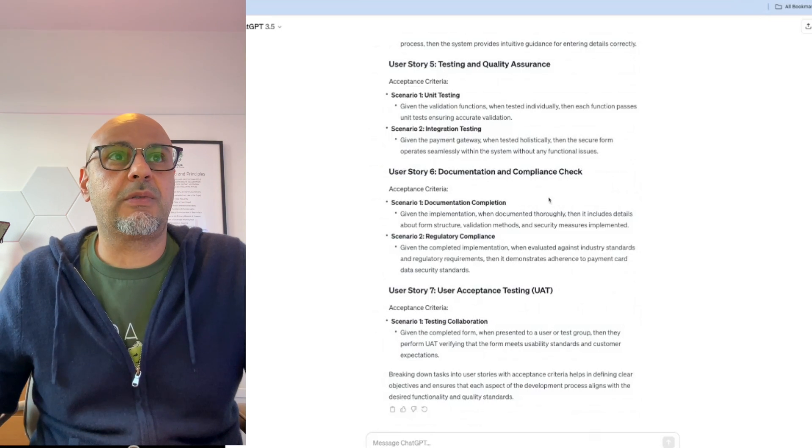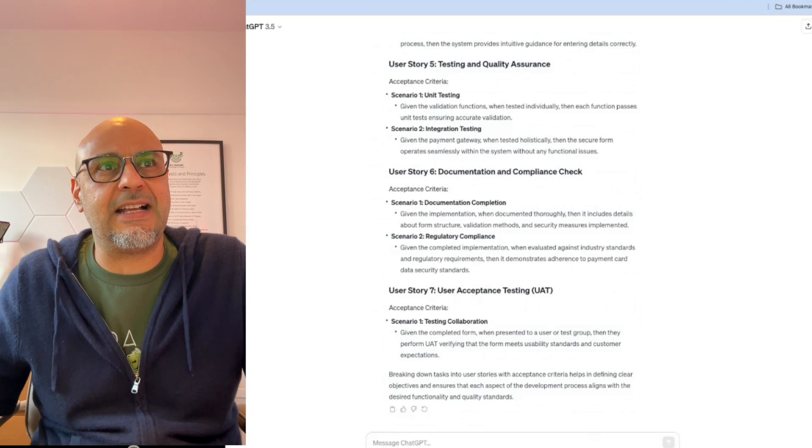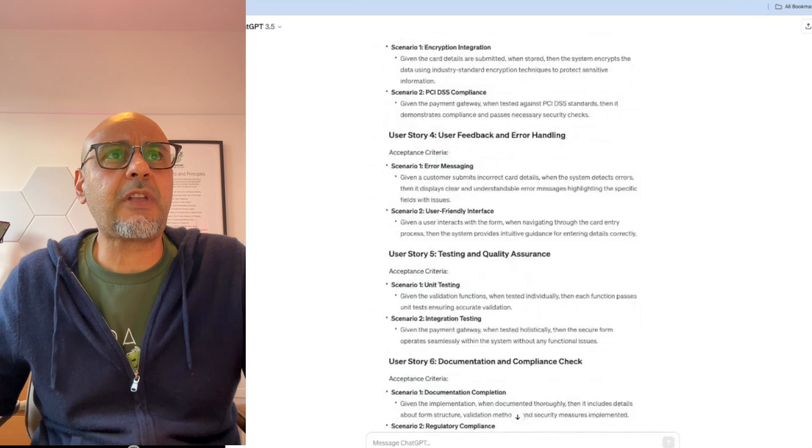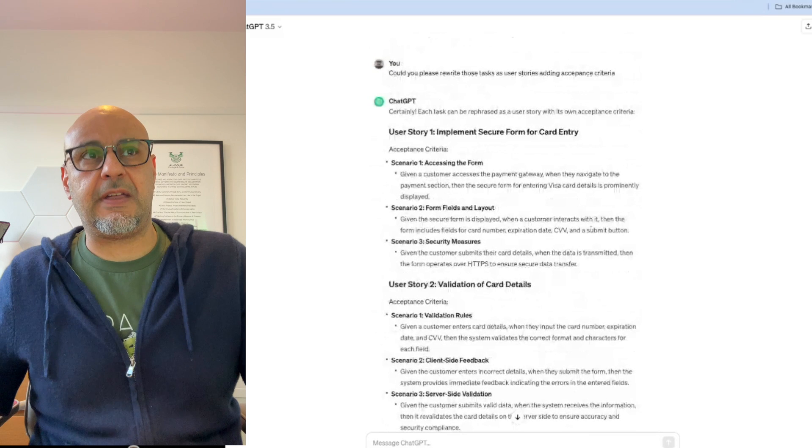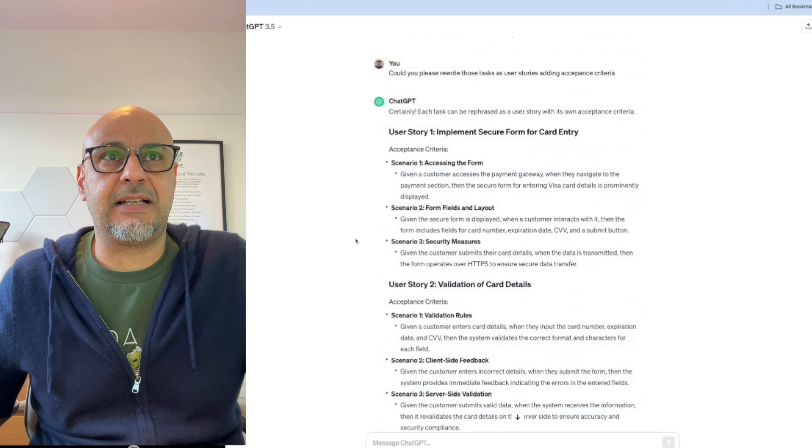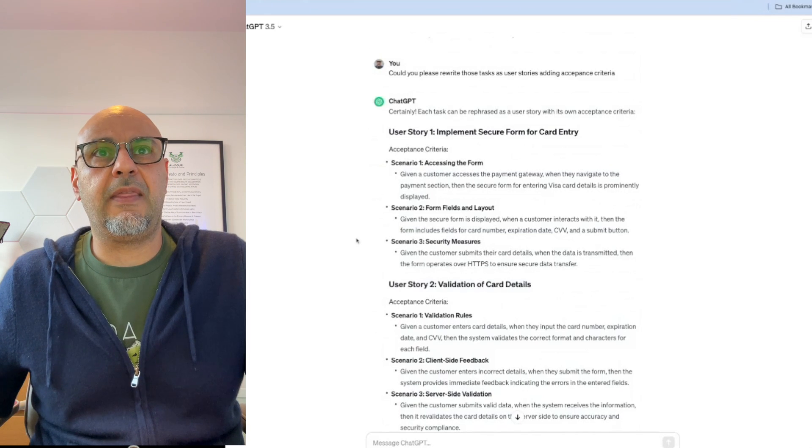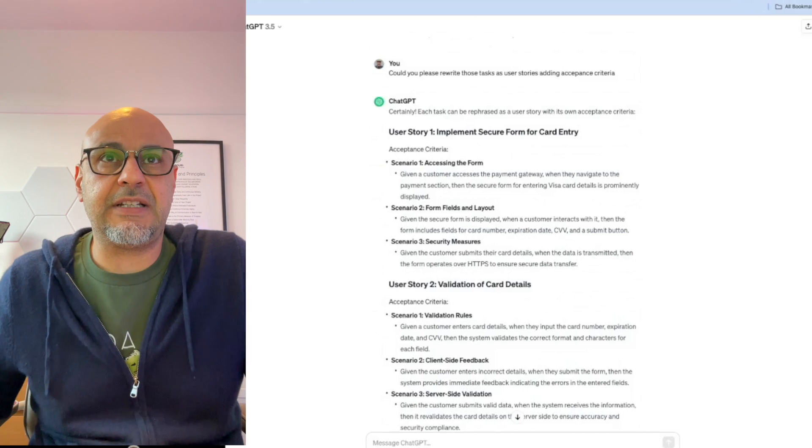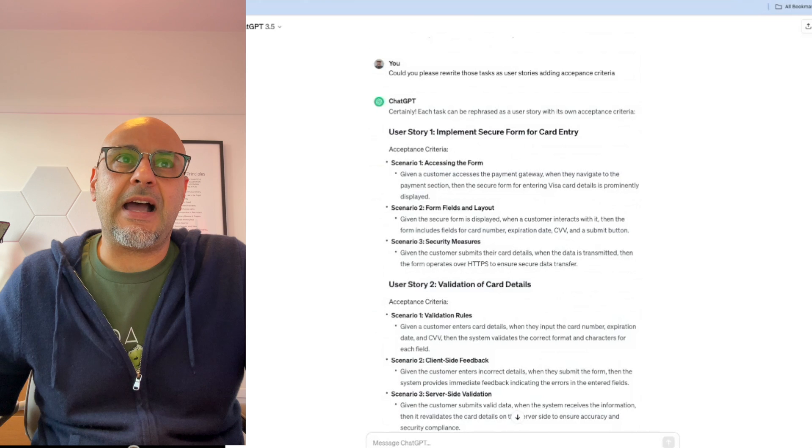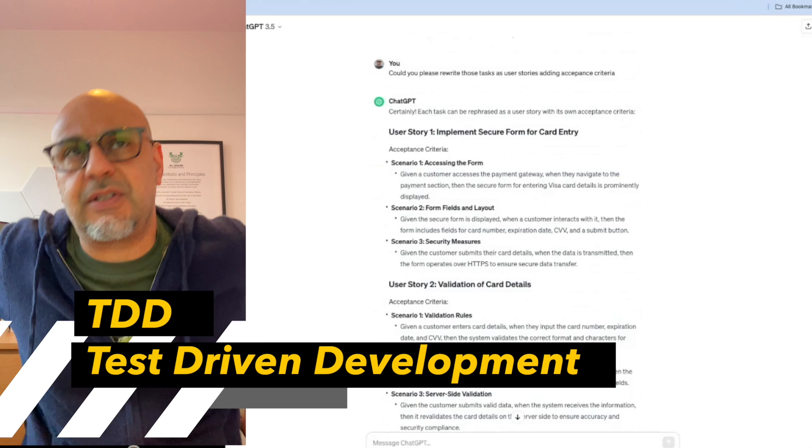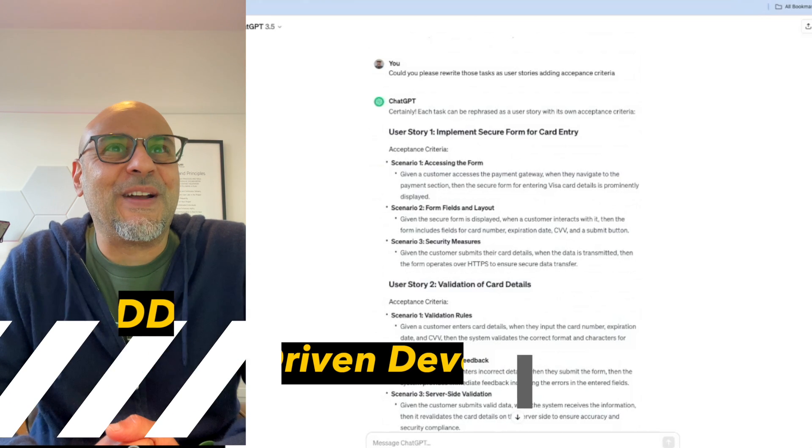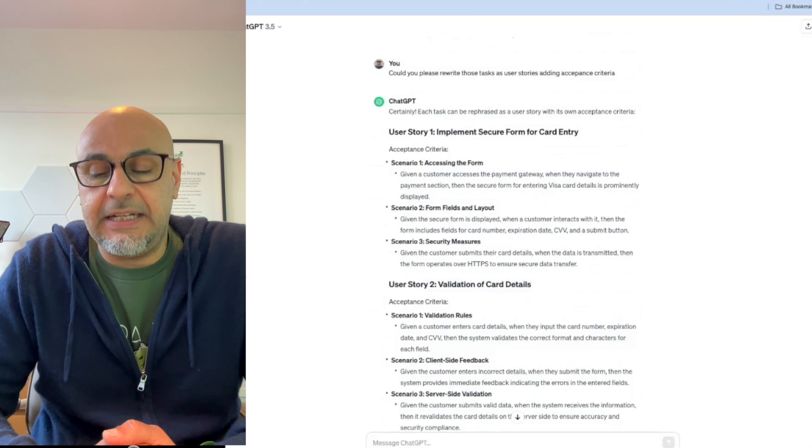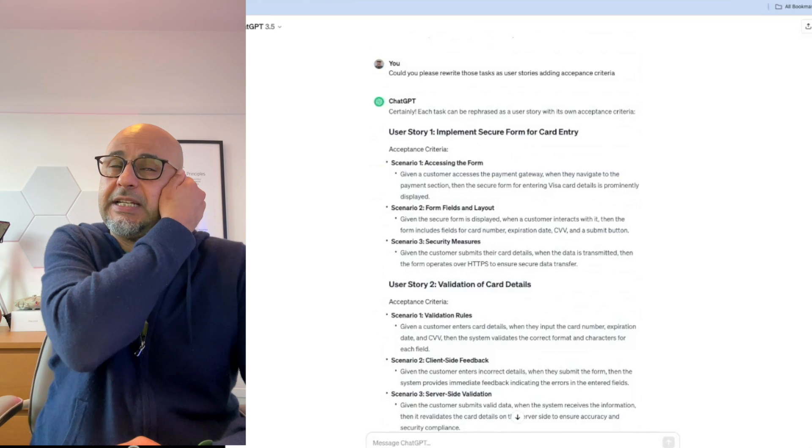So yeah, there we go. We've got all sorts of lovely stuff here. Scenario, it's written it as a scenario rather than user stories. So if you want to, you can add as a I want, so that. So scenario one, access the form, given a customer accesses the payment gateway, when they navigate to the payment section, then the secure form for entering Visa card details is promptly displayed. So given when then, I think that's called BDD. So it's written in a way that's really handy for the development team to pick that up and start writing it.